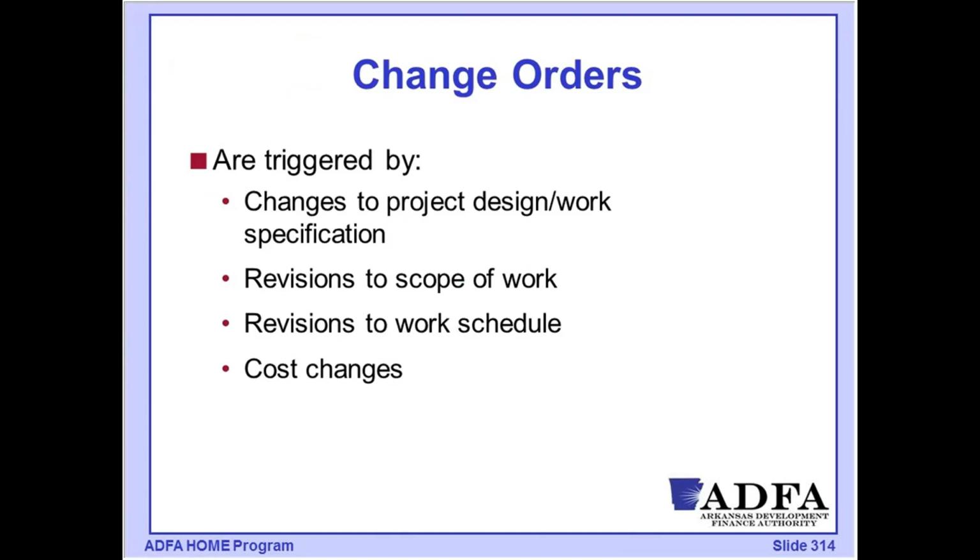So we need to talk a little bit about change orders. So change orders are triggered anytime that we have a change in that design, in the work specifications, when there's a change to that scope of work. So our project was, in most cases, going to have been procured. Folks bid on a specific scope of work, but it also could include things that might not have a financial impact, where we're changing a design, but the budget is not impacted on that.